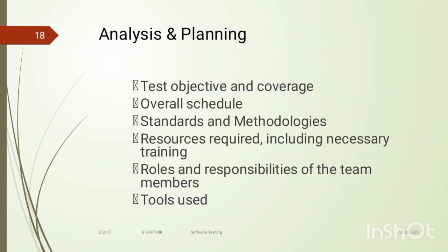And the second one is analysis and planning. Test planning in the software development lifecycle is a phase in which a senior quality assurance manager determines the test plan strategy along with the efforts and cost estimates for the project. Moreover, the resources, test environment, test limitations, and the test schedule are also determined. The test plan gets prepared and finalized in the same phase.